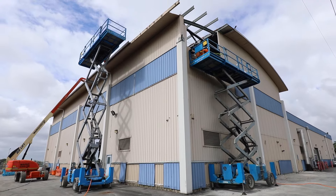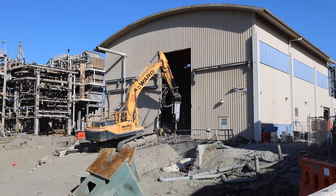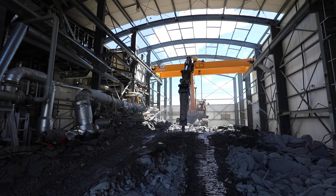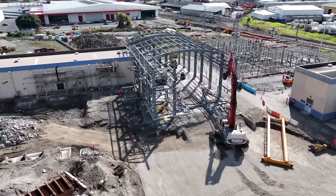The roof of the turbine hall required hand removal during the scheduled power outage to ensure the safety of our team and that no debris flew into the switchyard. We kept the walls of the turbine hall in place while we broke out the plinth to encapsulate the dust. We craned down the gantry and gently demolished the steel structure.